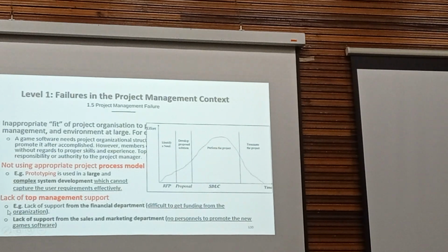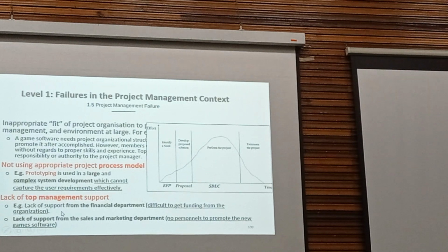The second reason for project failure is lack of top management support. For example, lack of support from the financial department means you have difficulty getting funding from the organization. Lack of support from the sales and marketing department means no personnel to promote the game software.